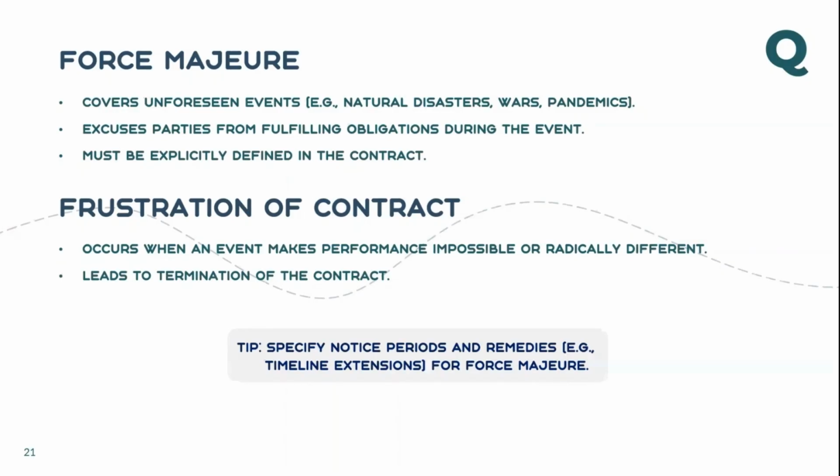There are some remedies. If there are no remedies, you should tell your management, dear management, I reviewed the contract, under force majeure we don't have any protection, okay? If something happens, we have to just go back, and that will be a big commercial impact for us. Those things you have to tell them. So you should say, let us look into repatriation possibility. Would they help us to send us back? Would they pay us a claim? Would they compensate in a reasonable way? All those things you ought to look into.